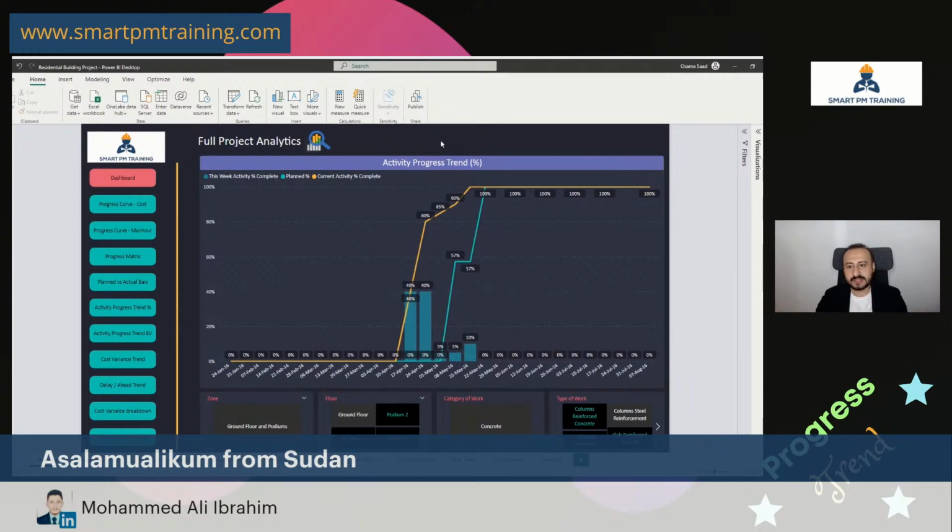In many cases, it's very hard to verify this information right away on the spot. You must do some additional work and analysis to verify that. So you have maybe to import the XER file, assign baseline, and review maybe the previous week's update and compare it with this week's update, so you can see the difference and determine how efficient the contractor is. It's a process, it's going to take some time, maybe half an hour to 1 hour if you are really good,